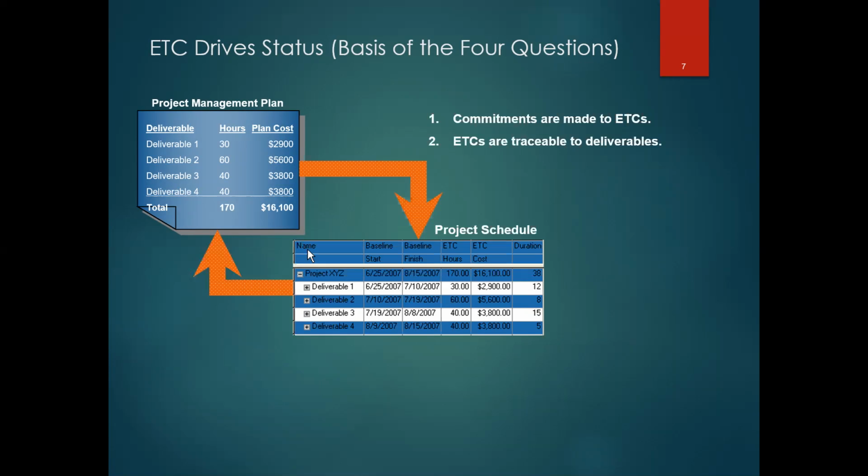So I do a schedule based on what I know. It's not the full project, it's what I know today. There may be some open-ended ones, but that's why I have change requests to update it. Or I write a new PMP when I get more information.